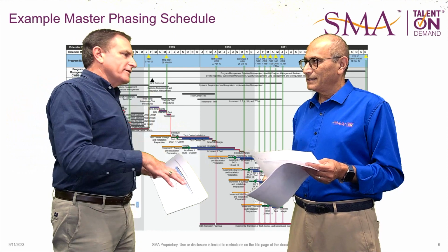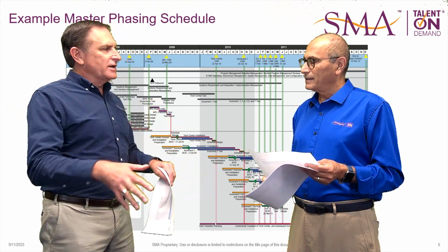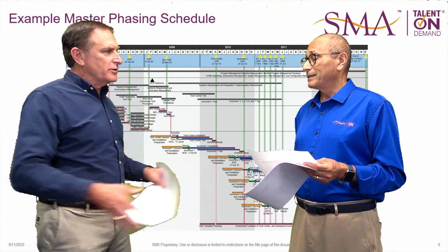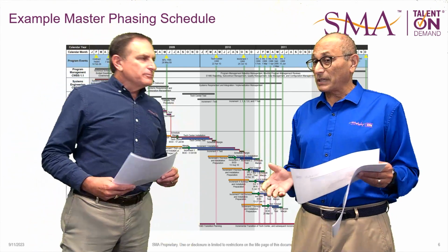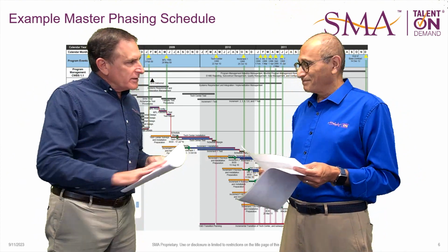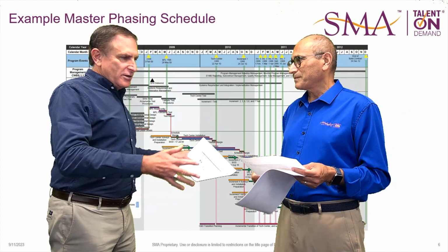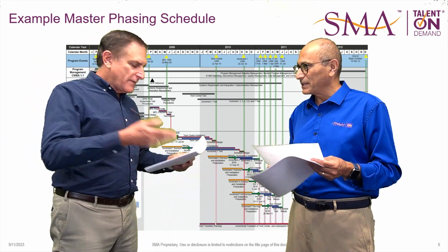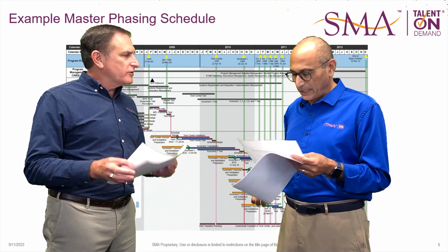wasn't going to work in this situation, because in order to test the second component, you needed the first one. In order to test the third component, you needed the first two. So it was complicated. It was very complicated, and so we actually had to rework all of this and not simply say build this one cabinet, ship it, test it. So it's not sequential. There's a lot of concurrency. And that's where this helps, because it boils it down to something everybody can consume.